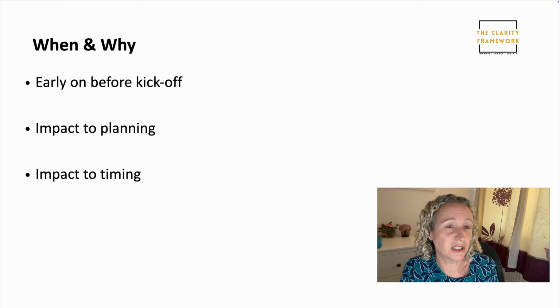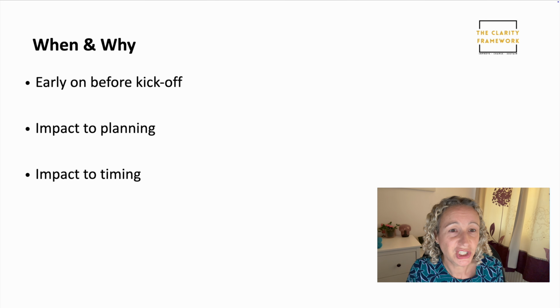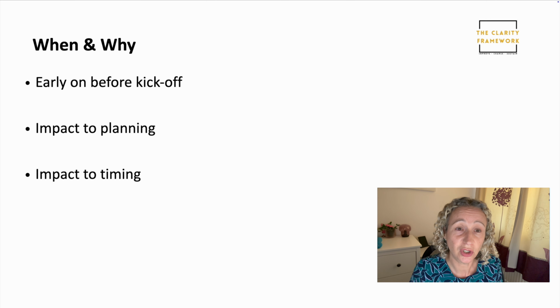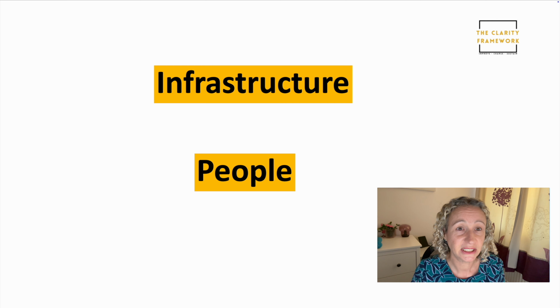Also, another reason to do it early on is because it could also have an impact on your timing. One thing that your change readiness assessment might uncover is that maybe there's other stuff going on in the organisation. Now's not the right time to implement another change. And if that's the case, maybe the change would be better received in a couple of months. So you don't want to hold your kick-off meeting and then find, oh, actually, we're going to have to delay the project for a couple of months, because it's got a lot more chance of being successful if that's the case.